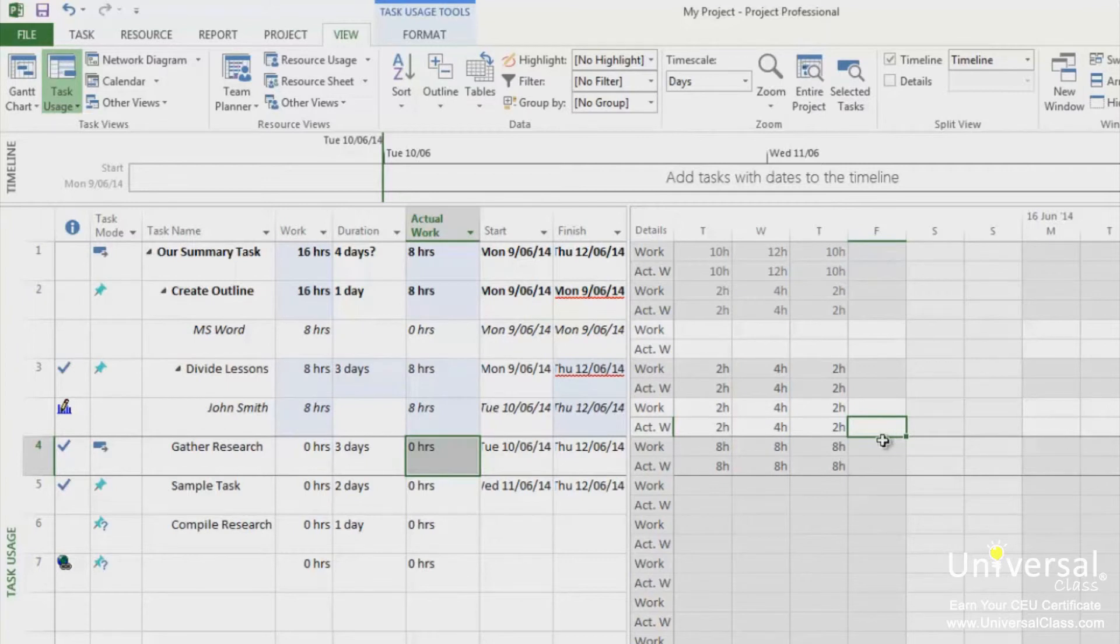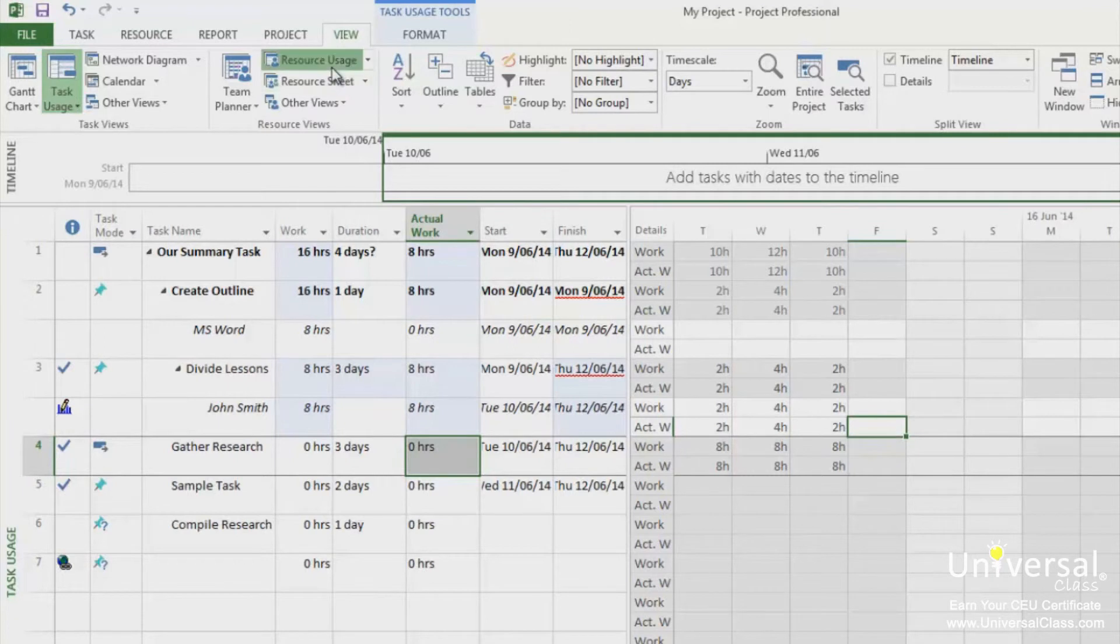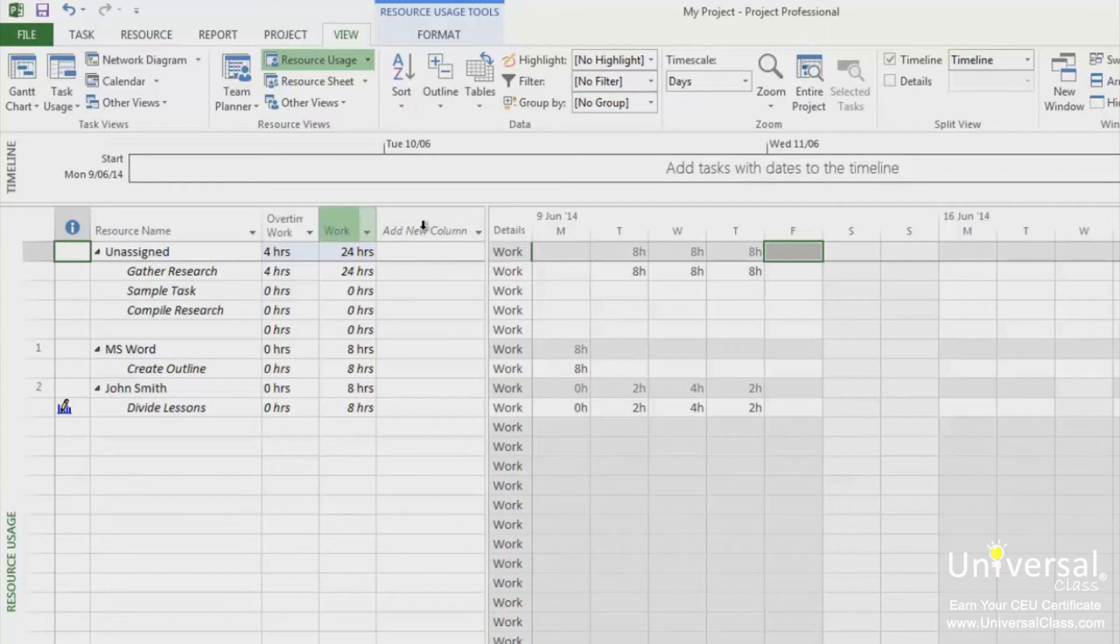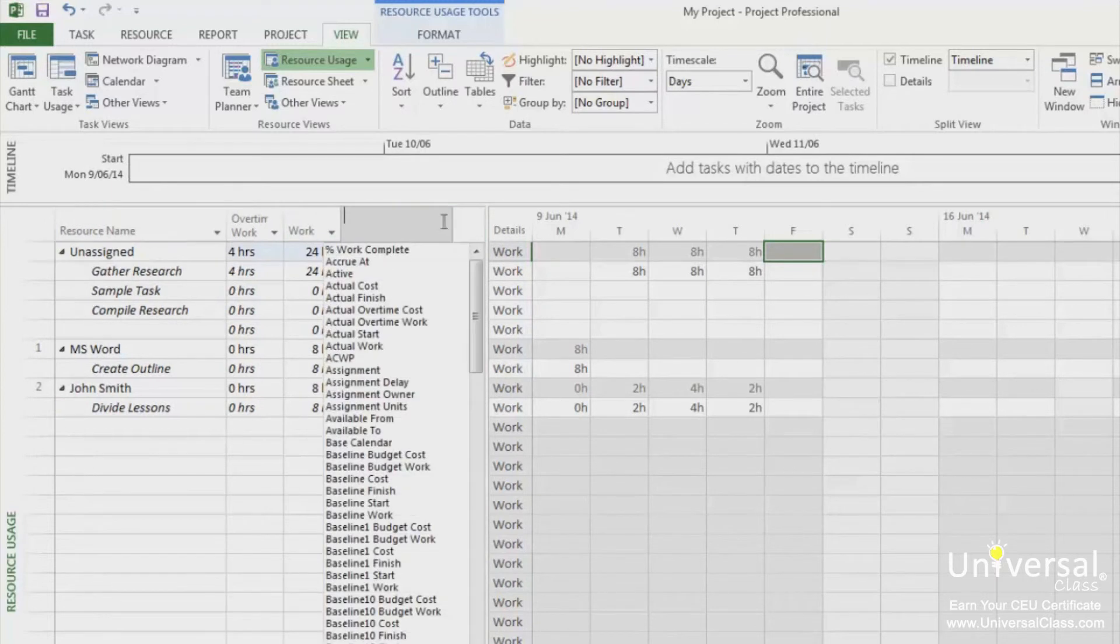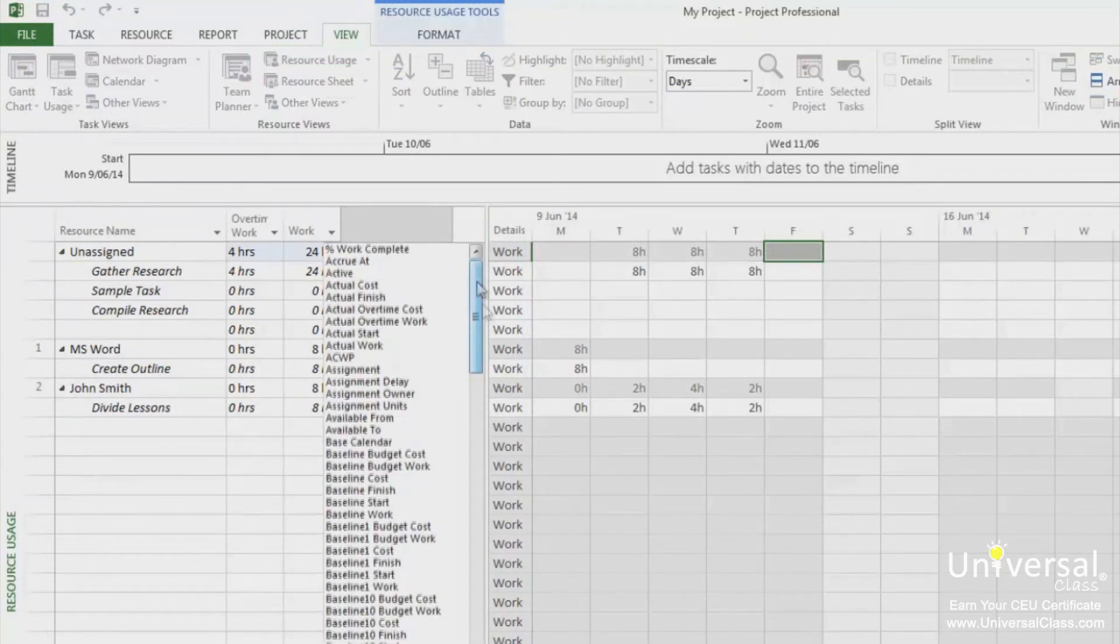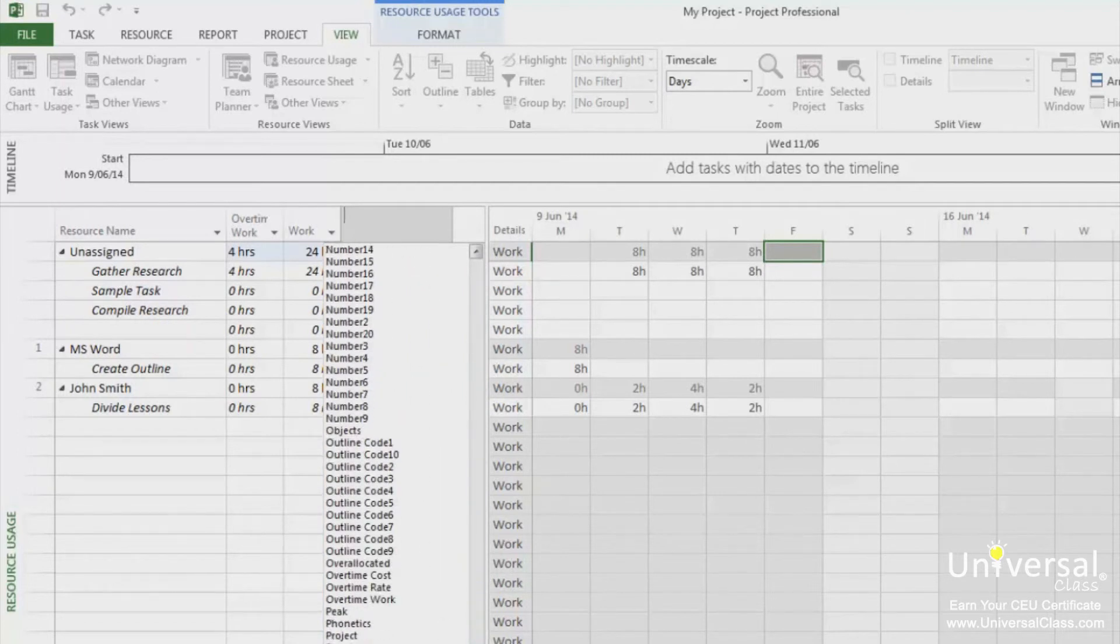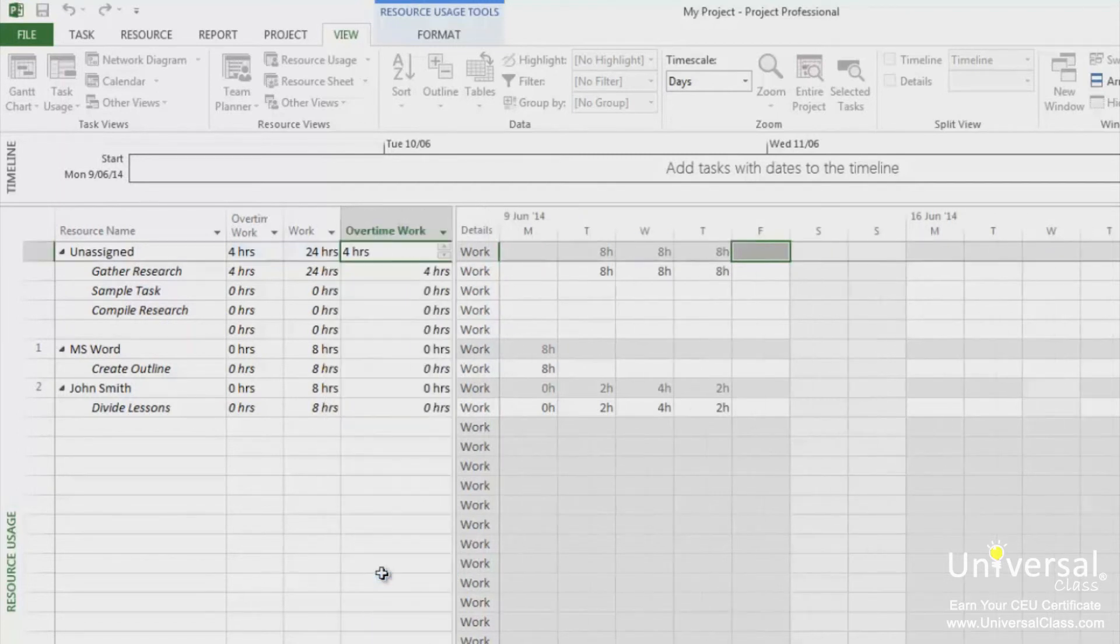To enter overtime for a resource, go to the Resource Usage view. Insert a new column. Select Overtime Work from the list for the type of new column. In this example, you can see that I already have Overtime Work inserted. But if you don't, you can scroll down to the bottom where you have Overtime Work and insert that.